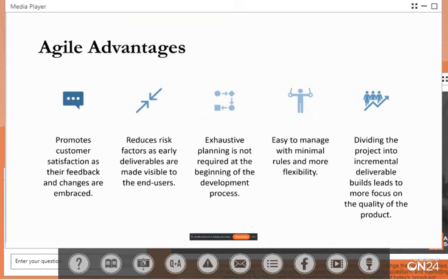We also reduce risk, right? By having incremental deliverables, what if I decided to make a Dynamo graph, and this Dynamo graph was going to solve this crazy thing in my project workflow. Then we determined we're going to do this in increments, and we released the first increment, and then we realized that all of the other features that we needed are actually extraneous and a distraction, and it was the first thing that we needed, and only that. That's a really powerful thing.